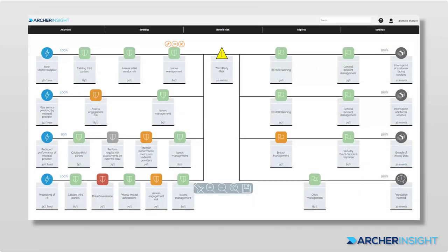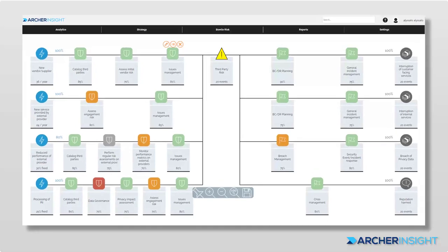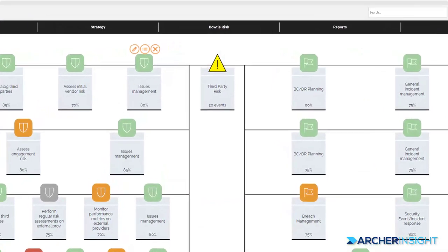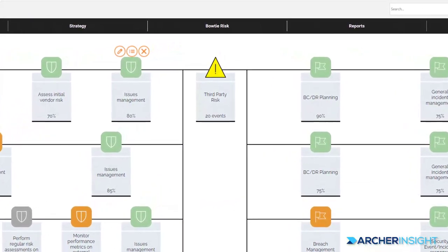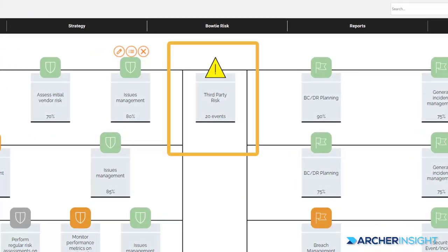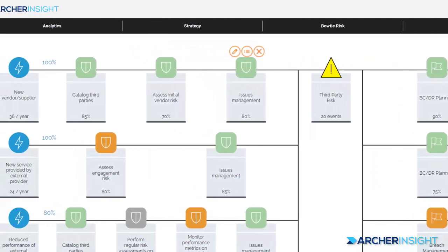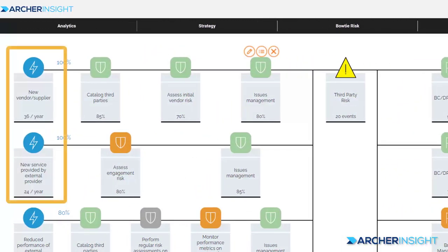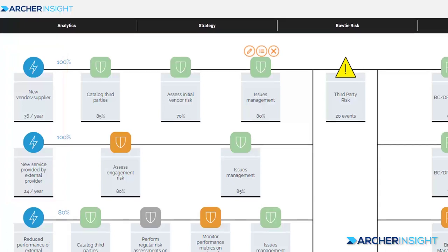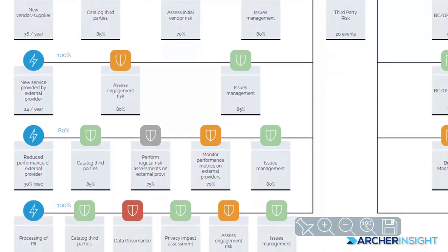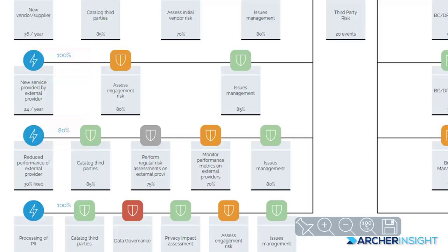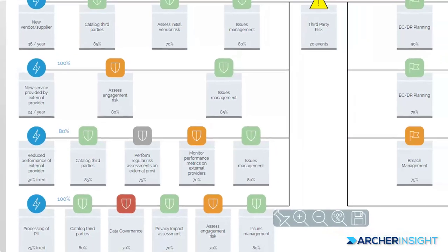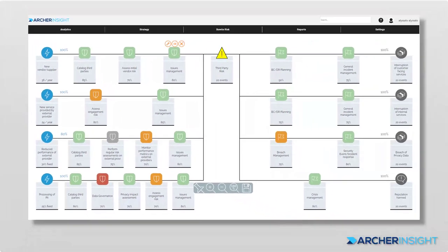Archer Insight automatically converts the key risks in your risk register into detailed risk bow ties for deeper analysis. The center of each bow tie represents a more granular risk register definition — the risk event. This allows you to create drivers or threats that can induce or influence a given risk event to occur. For any given risk event, there can be one or many causes with different probabilities of resulting in the risk event. This bow tie view allows you to outline many possible scenarios and probabilities for drivers to result in the risk event.